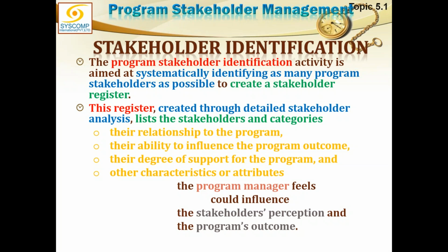But then there is yet another thing, that is, how your behavior is going to be with this stakeholder, how you will interact with that stakeholder, what is your strategy. Now, one way of doing it is to put it in the register, but I would strongly go against it. You should not put it into the register, because the register is a public document which could be accessed by anyone for any purpose.